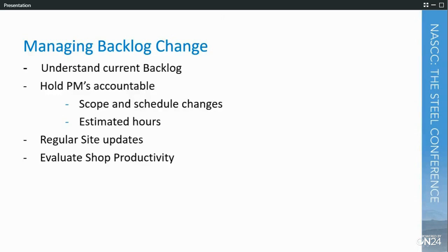And so in order to do that, we really have to understand what our project schedules are like and how they're trending, because realistically, if in 2 weeks we know a sequence is going to delay a few days, we might change our priorities this week because we know that one's pushing out, and we can modify it and maybe move something else around that'll help us produce better on another project. So we're trying to be more real time, but that's the benefit of having the regular interaction that we need to have with our PMs.